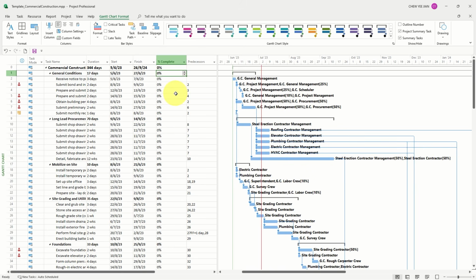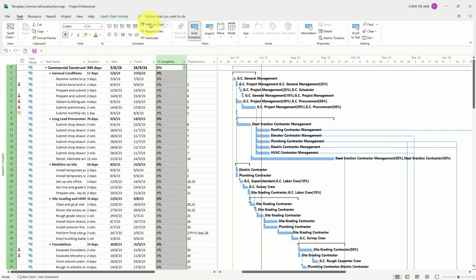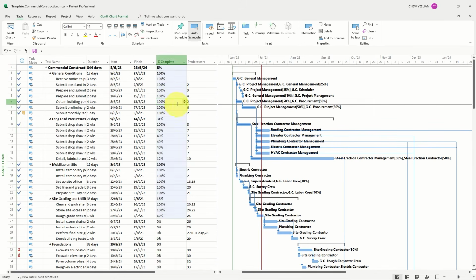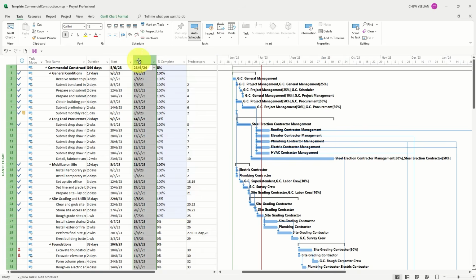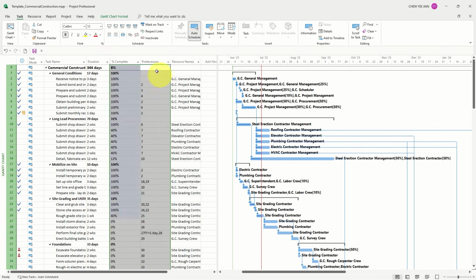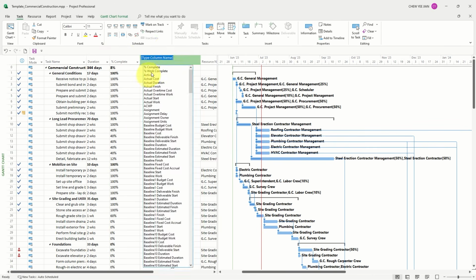So what we are going to do here is make a copy of the scheduled percent, which is, for example, everything until the red line here, how much of the percent has been completed. So we are going to use the mark on track. And this will tell you that at this particular 3rd July, how much of the percentage we should complete. Okay, so with this in mind, we are going to create a new column. But before that, I think I'll hide away some of it first and add a new column here.